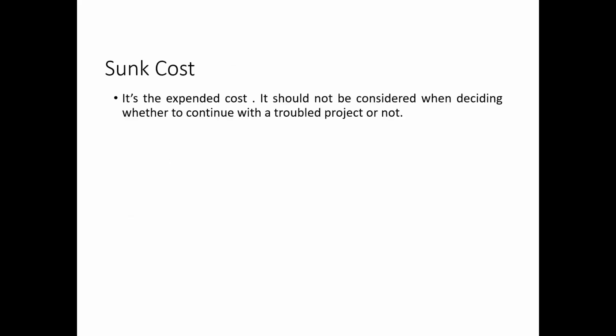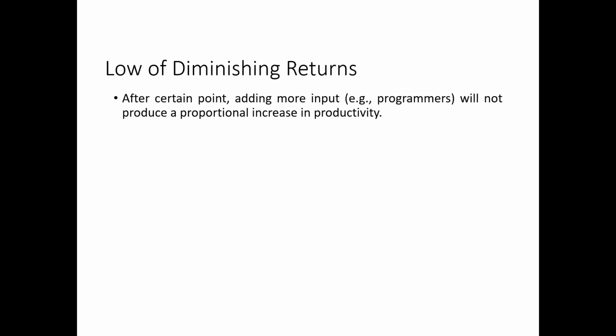So what is sunk cost? It is a cost expended. It should not be considered when deciding whether to continue with a troubled project or not. So it is an expended cost. Then the law of diminishing returns: after a certain point, adding more input, the programmers will not produce a proportional increase in productivity. So that's why it is called the law of diminishing returns.